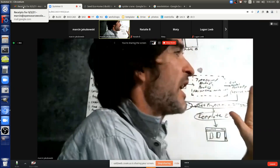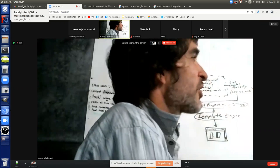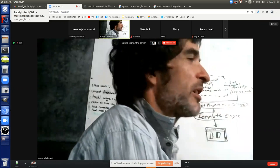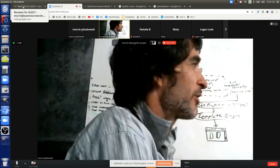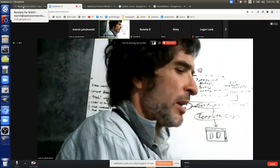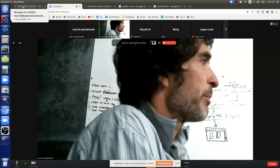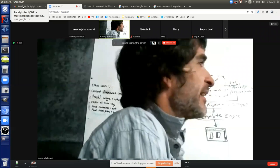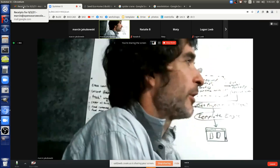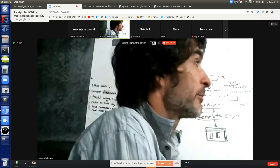We should not have any problem to align it squared within like a quarter inch. That should be relatively easy. The only trick is, are people holding the tape right, or any kind of inconsistency there, or the thing we're measuring against is moving around. Well, let's fix that first short side. Then we keep the long side flexible. I mean, that's not fixed.